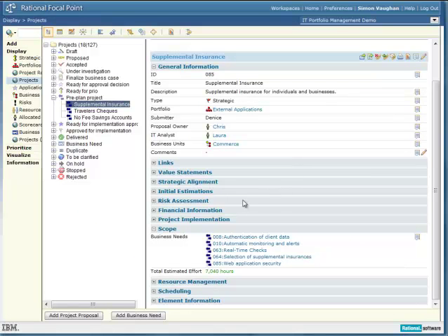Okay, so when we pre-plan a project, one of the things that we might do is sit down with the stakeholder and agree what high-level capabilities the project would be delivering. So these are things that are recognized by the business, and the advantage of doing this is that if we split the project down into bite-sized chunks, then if we encounter problems within delivery or if new things come in, it becomes much easier to deliver incremental value to the business rather than holding a number of capabilities at ransom because we identify problems in other areas.